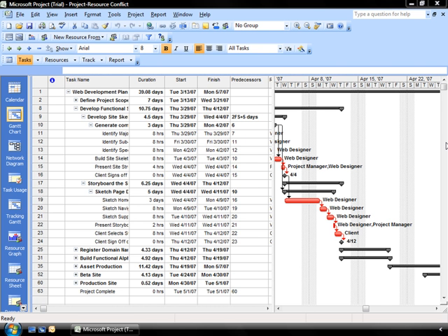So it's going to be working within a regular workday, but it doesn't necessarily check to see whether or not you've already assigned that resource to other tasks. So in shortening your critical path, you may over-allocate your resources. And that's not healthy for anyone, the person being over-allocated or the project manager who's going to have to deal with disgruntled employees. So we want to avoid that at all costs.